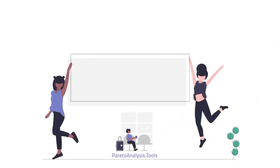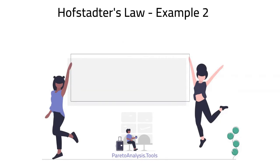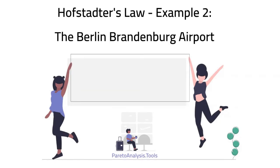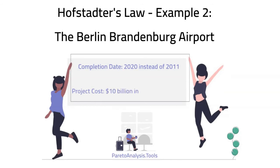The Berlin-Brandenburg Airport: after 15 years of planning, construction began in 2006, with the opening planned for October 2011. There were numerous delays and many setbacks, and it was finally opened on October 31, 2020. The original budget was $2.83 billion, but current estimations are close to $10 billion.